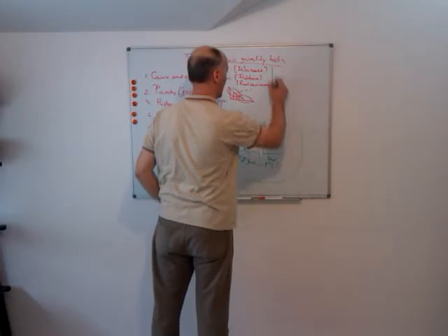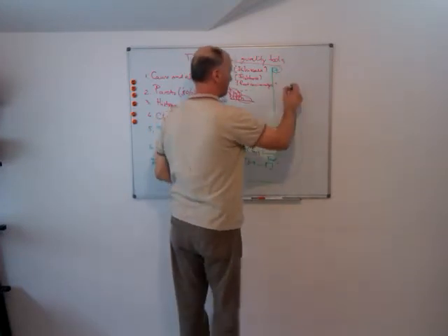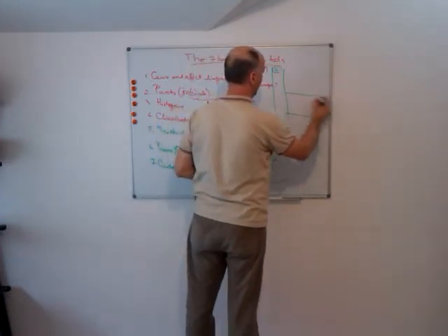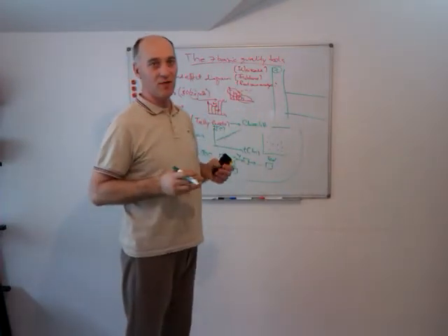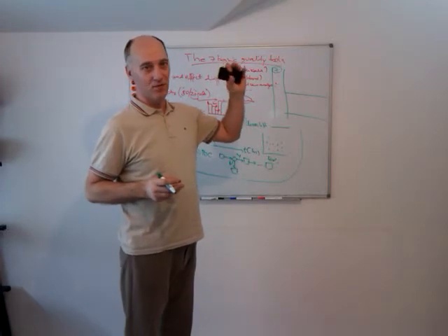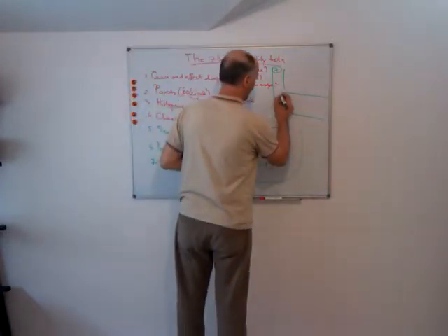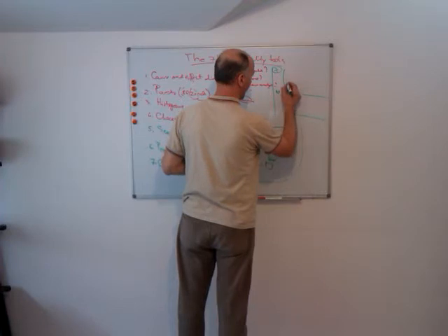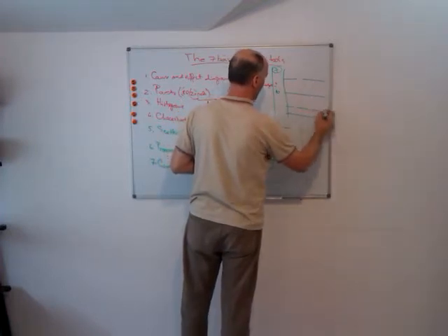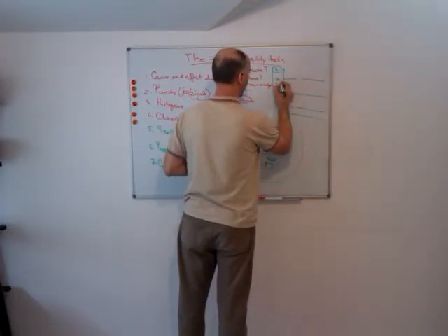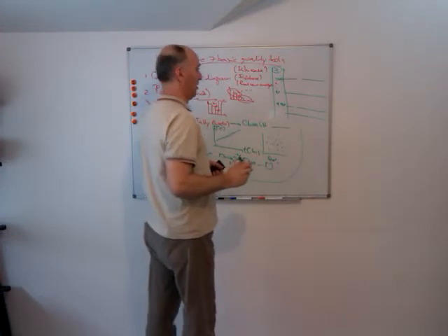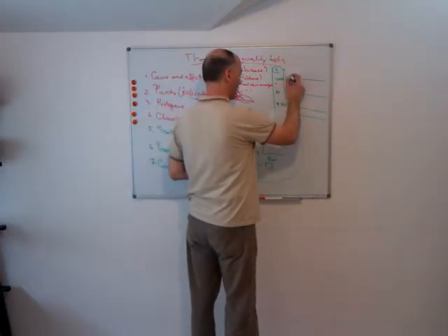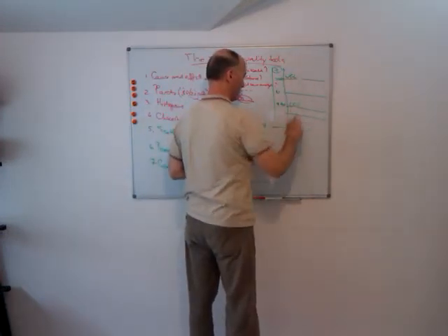So this will be our number 7. If this is the average, imagine you have to construct a piece of material which is 10 millimeters wide. So this is 10 millimeters exactly, and our limits will be 10.02 and 9.98. So these are the upper control limit and the lower control limit.